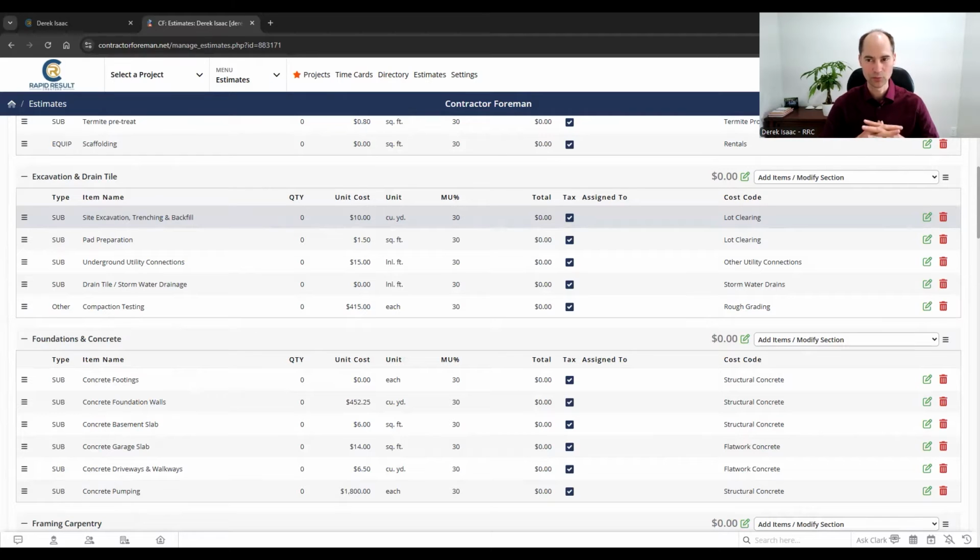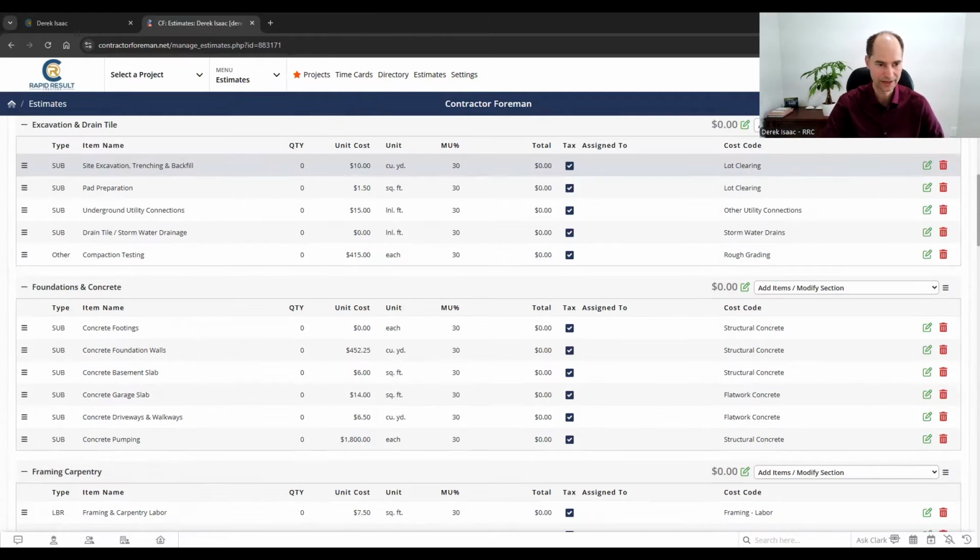And excavation is definitely one of those things where you should have concerns about what's underneath the soil, because you never know what you could find, old oil tanks or who knows what, and it's going to cost a bunch of extra money, right? You don't want to put a fixed price on the excavation unless you're very certain, because you've built here before, or there are houses next door and you know what's underneath. Other than that, you've got your connections.